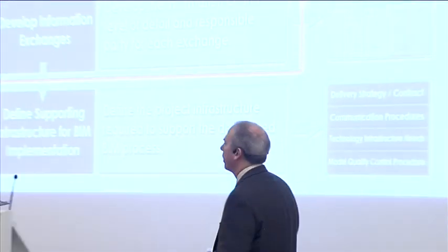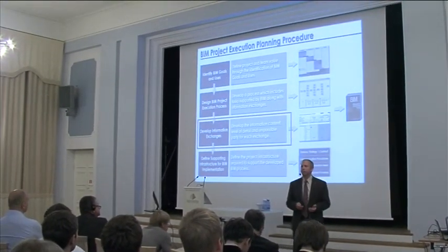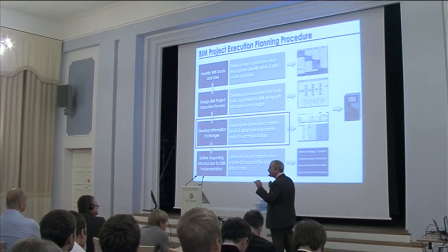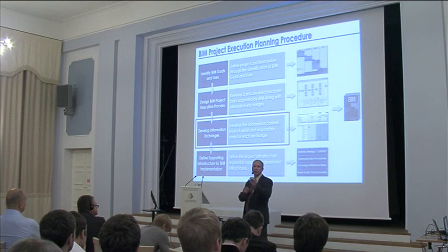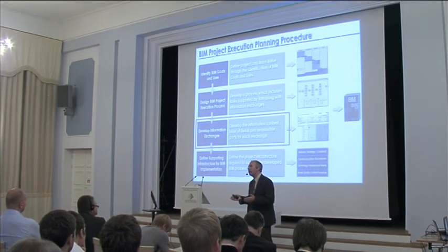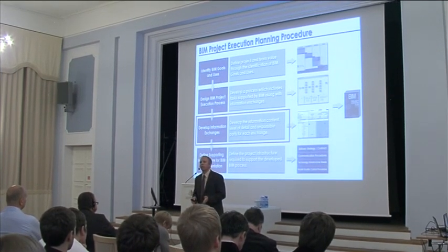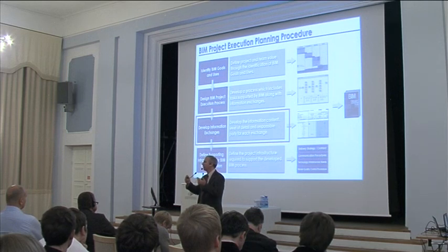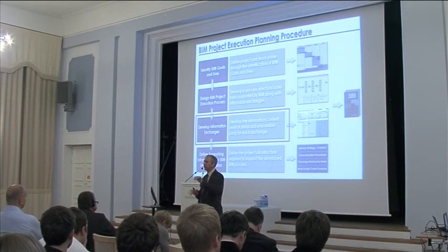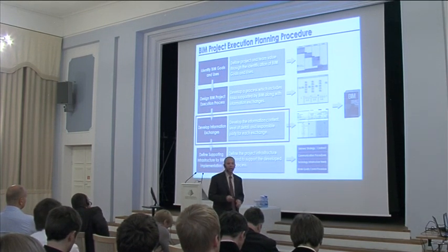The third step in the planning process is looking at these information exchanges. So once we've mapped out our process, we know where the key handoff points need to be in that project. And then we need to define what are we going to hand off. So what is the information, what's the format, and what is the content of that information that needs to go from one participant to the next participant so that they can do their job.